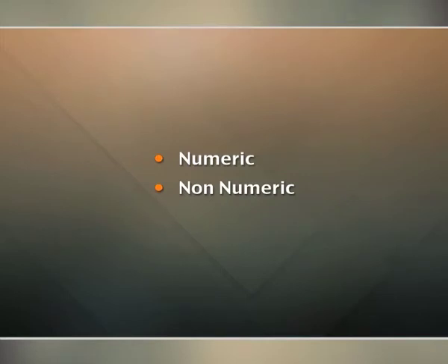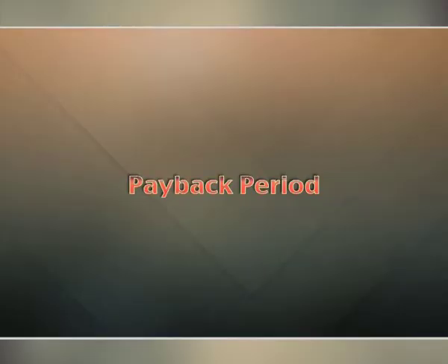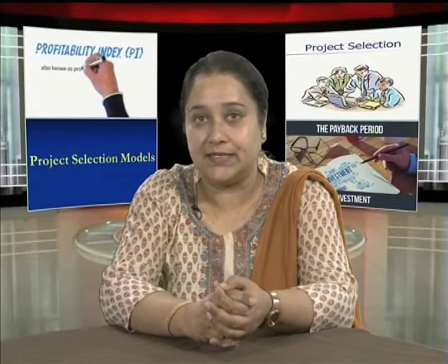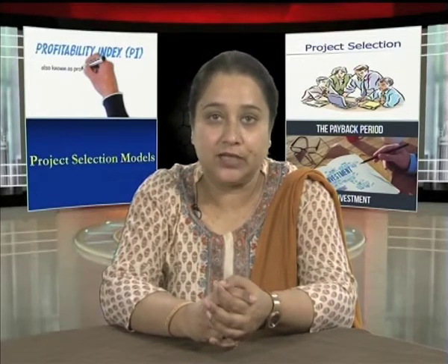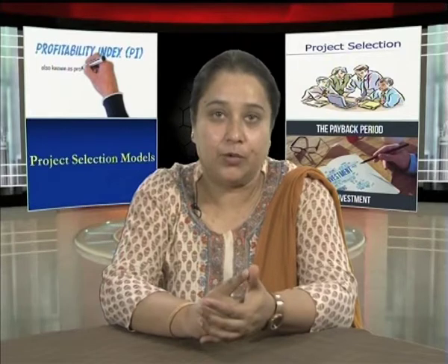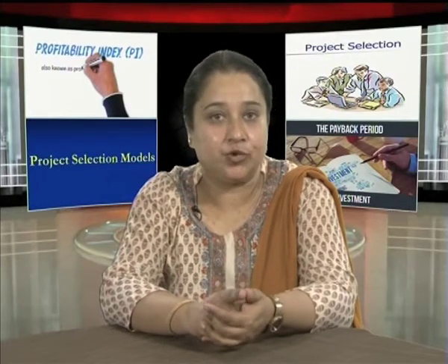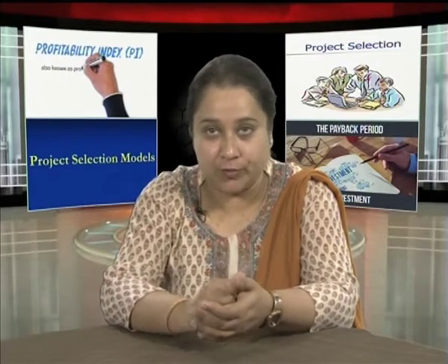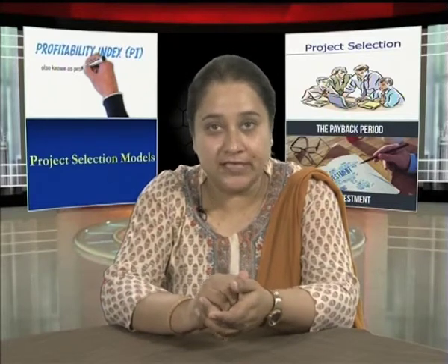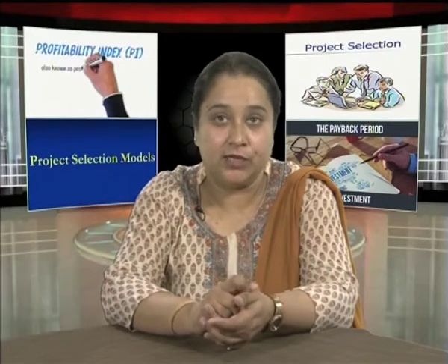There are two types of selection models, numeric and non-numeric. The various types of numeric models are: payback period. The payback period is the length of time required to recover the initial cash outlay on the project. In this, the initial fixed investment in the project is divided by the estimated annual net cash inflows from the project. The ratio of these quantities is the number of years required for the project to repay its initial fixed